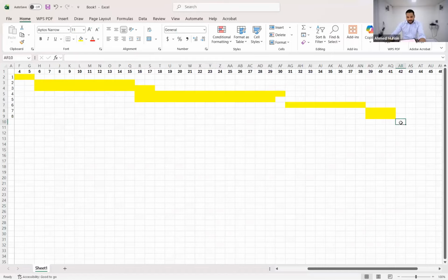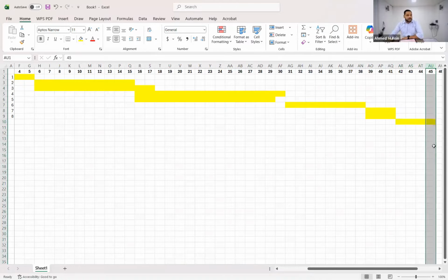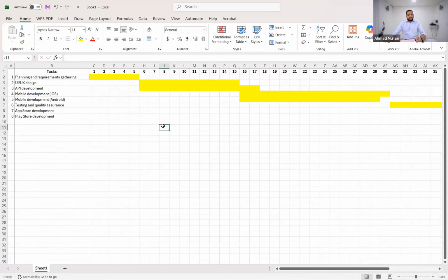Okay, so now, guys, girls, 7 and 8 is these two. After this is done, it will take how many days? 4 days, no? 1, 2, 3, 4. So everybody, in total, it's taking about 45 days to complete this project. Okay, but now when you look at this, you can immediately understand the dependencies, right? You can immediately understand what tasks can take place simultaneously, right?